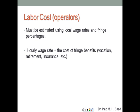The labor cost for the operator must be estimated using local wage rates and fringe percentages. The human resources department in your company will provide these numbers. The hourly wage rate plus fringe benefits — including vacation, retirement, health insurance, workers' comp, and any other benefits — all must be added to the labor cost.